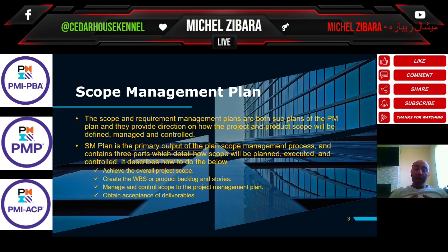So WBS mainly uses decomposition. We're going to go about it just quickly at a very high level: decomposition of the project into levels, and every sub-level depends on the level before until you reach the smallest manageable deliverable, not activity, pay attention, the smallest manageable deliverable, which then in the schedule management chapter 6 is going to be divided into activities where you will have your project schedule.